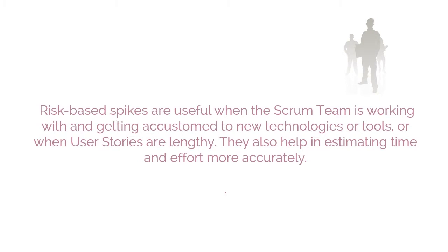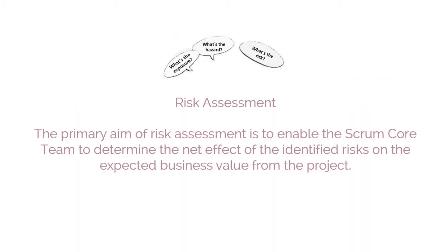Risk-based spikes are useful when the Scrum team is working with and getting accustomed to new technologies or tools, or when user stories are lengthy. They also help in estimating time and effort more accurately.